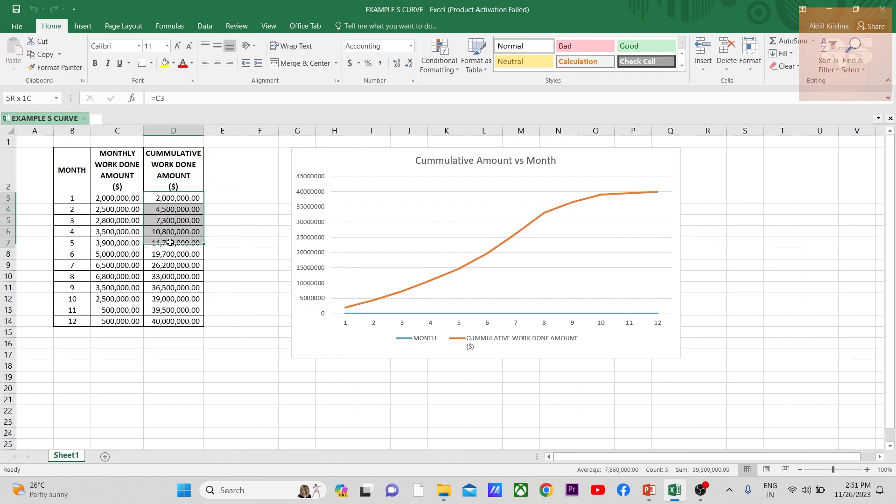In the third month, it will be 2 plus 2.5 plus 2.8, that is total till the third month. Like that it goes on. At the end of the 12th month it will be the completion of the project and the complete amount will be claimed.